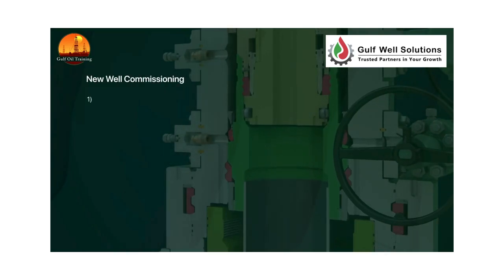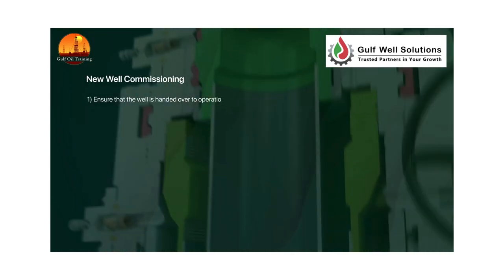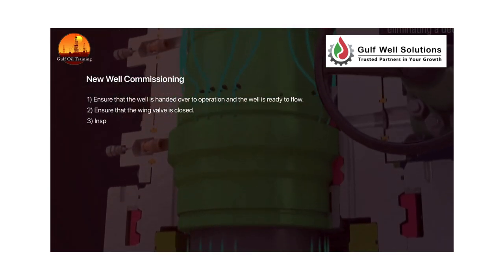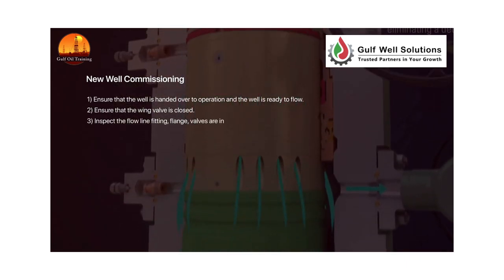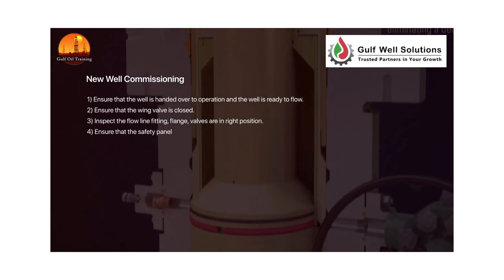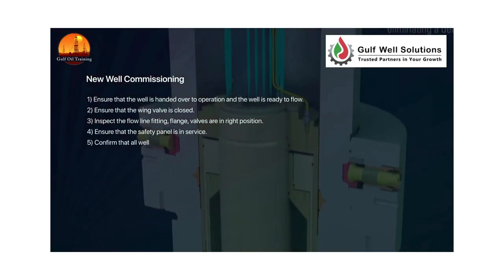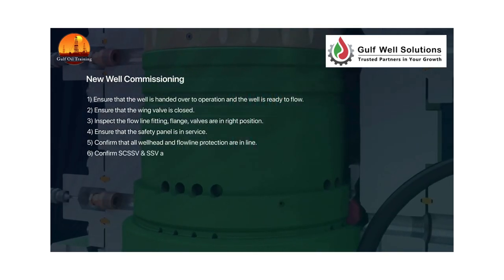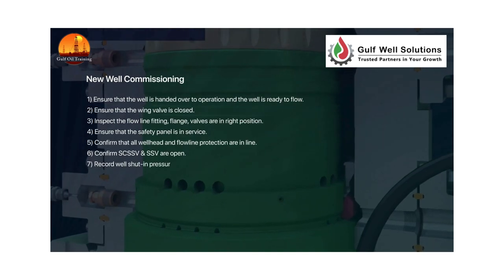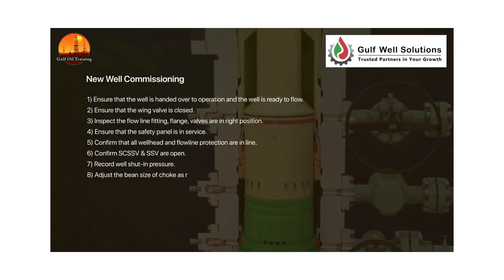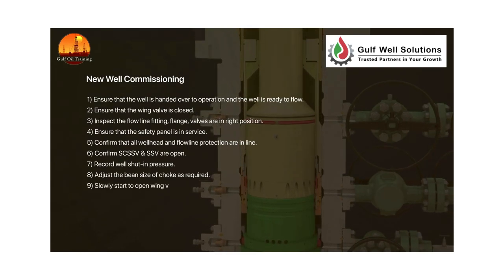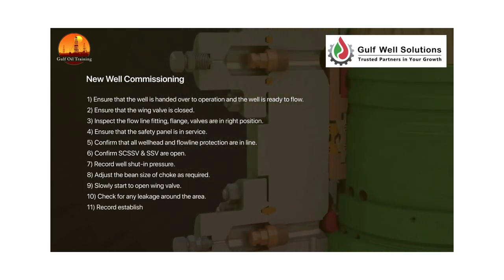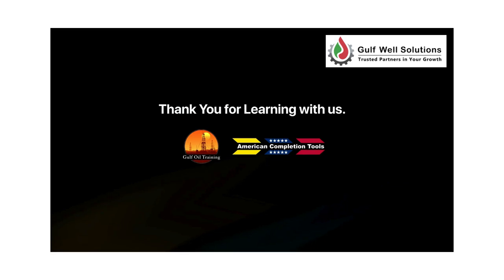New well commissioning steps: 1. Ensure that the well is handed over to operations and is ready to flow. 2. Ensure that the wing valve is closed. 3. Inspect the flow line fittings, flanges, and valves are in the right position. 4. Ensure that the safety panel is in service. 5. Confirm that all wellhead and flow line protection are in line. 6. Confirm that SCSSSV and SSV are open. 7. Record well shut-in pressure. 8. Adjust the bean size of the choke as required. 9. Slowly start to open the wing valve. 10. Check for any leakage around the area. 11. Record established wellhead parameters.